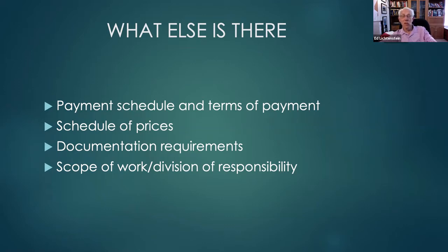Problem was, we didn't use the format that the customer required and hadn't priced what it would cost us to provide the documentation in the format required by the customer and the contract. It took us a lot of money and about 7 months to a year to resolve that problem, turning the documentation into what the customer wanted.